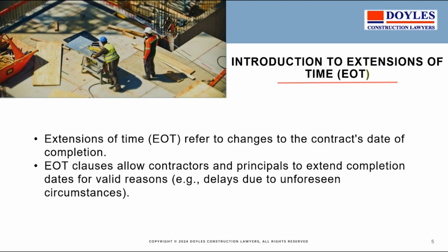On the other hand, if the principal delays the project, then he won't be able to insist on liquidated damages or a particular time of completion unless he's got a specific clause in the contract that allows the completion date to be adjusted.